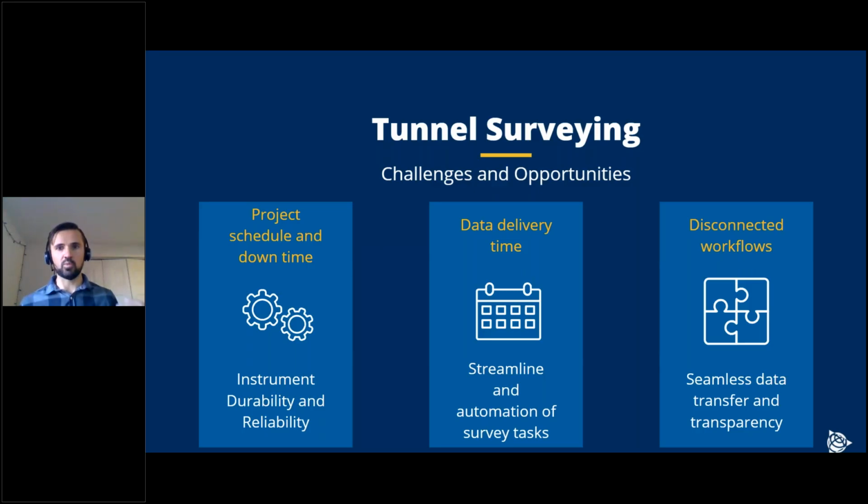Starting on the left-hand side, we talk about project schedule and downtime. So tunnel construction projects are often 24/7 efforts. They're continuous construction operations. Any downtime in that construction can lead to significant costs and delays in the project. So it's really important for surveyors to have confidence in the equipment and the technology that they're using to ensure that they can provide data to the construction teams, whether it's to the machines, to the geologist, whoever it might be, to ensure that that process can continue on uninterrupted.